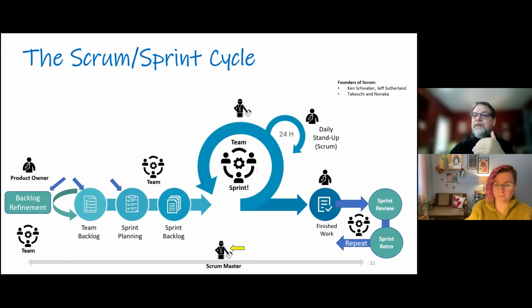That's why in the sprint cycle in the industry, we use two weeks, because it time boxes you. It says, okay, you've got to break things down such that they reasonably can be done in this period of time. It's a forcing function that forces you to break down the work into smaller pieces. The bigger work expands to the time allocated to it.